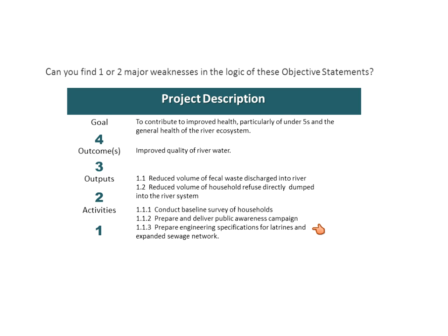That's exactly right. Now, one of the problems that you have with a Logframe is that you're only writing selective activities, so that's almost always going to be true, and that's the reason why when you come to implementing a project, just before implementation, you're going to do detailed planning through your work breakdown structure that will provide a lot more detail in the activities. But obviously these activities that are listed here are certainly not detailed enough. That's a great point. All right, so those are a couple of the things.